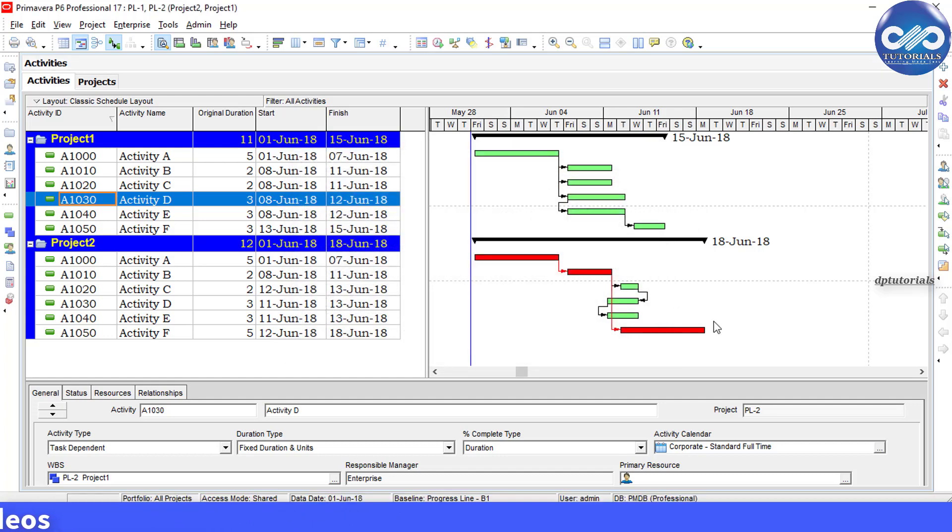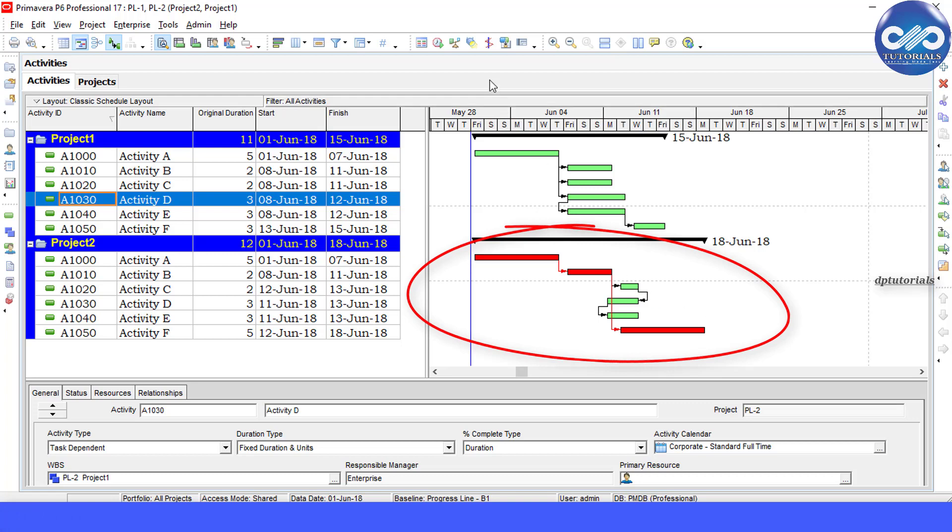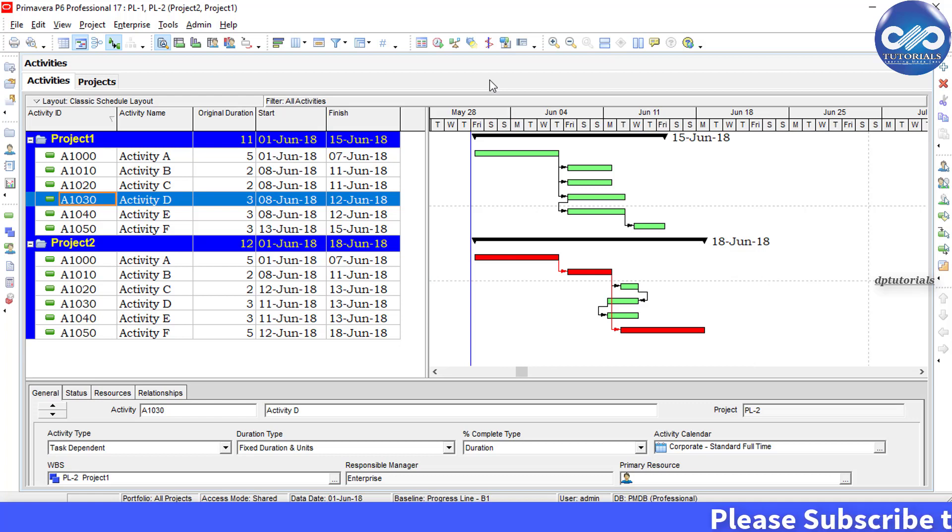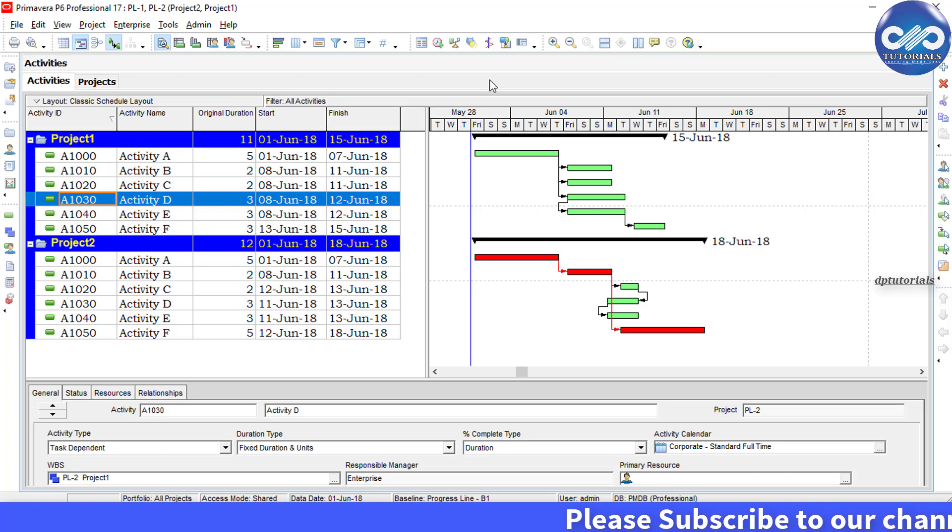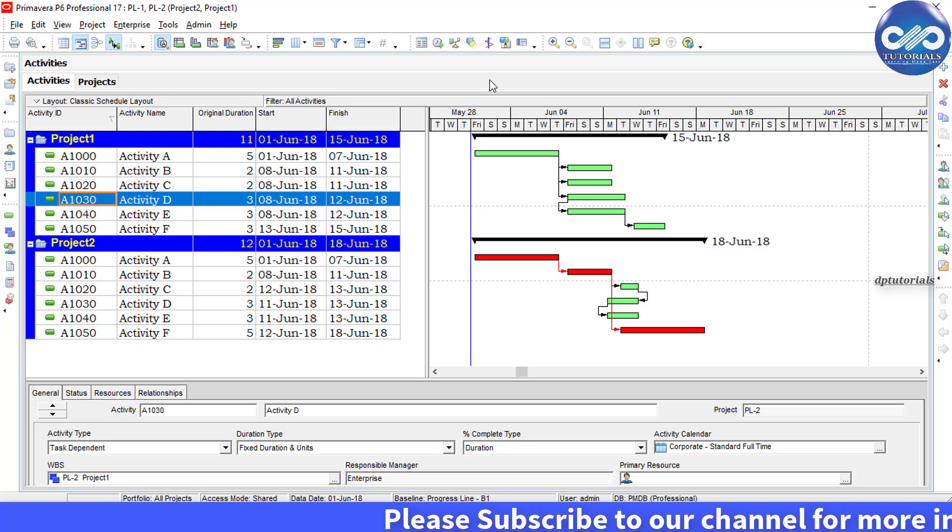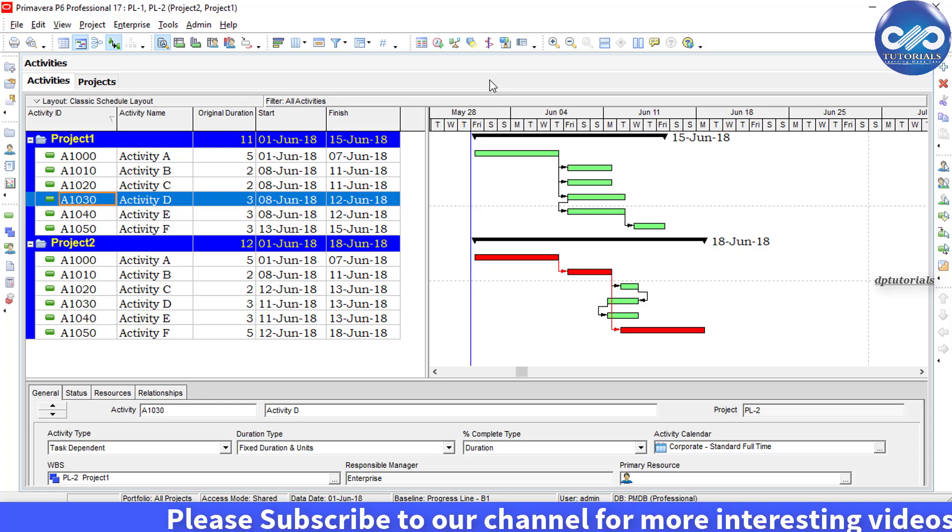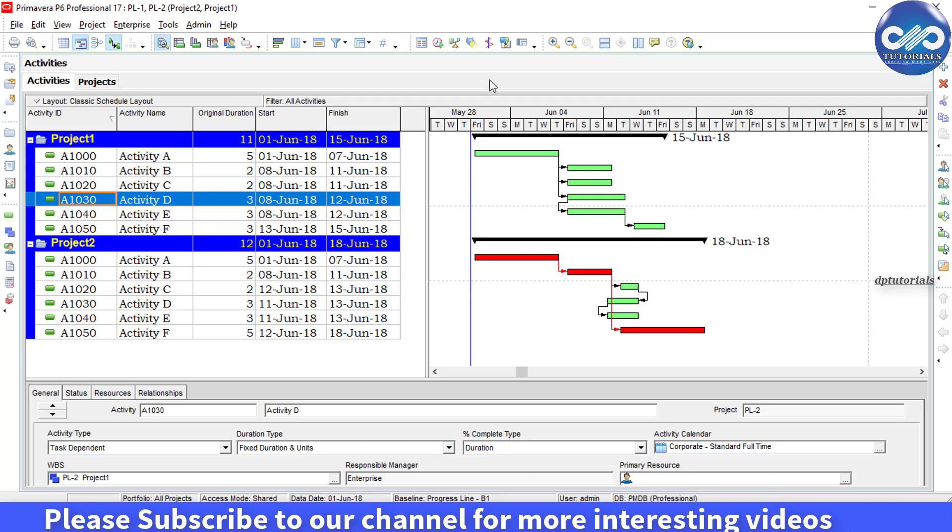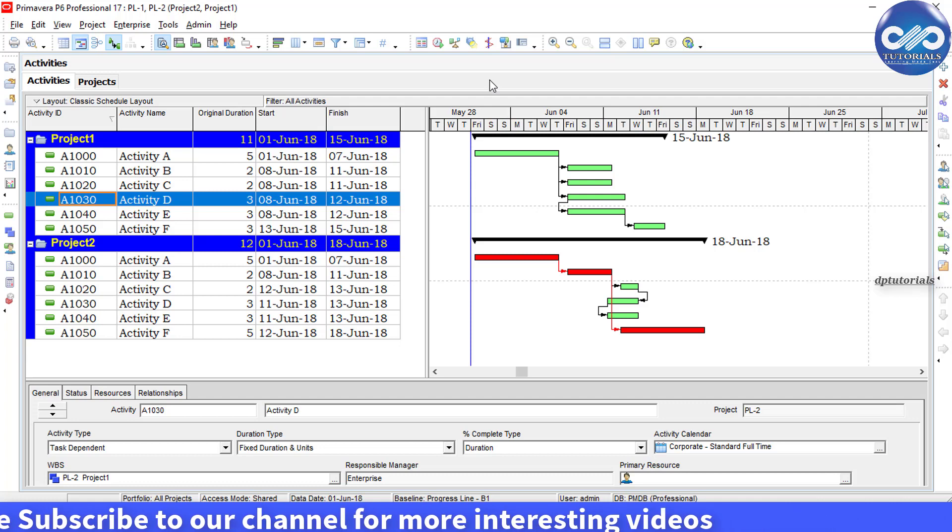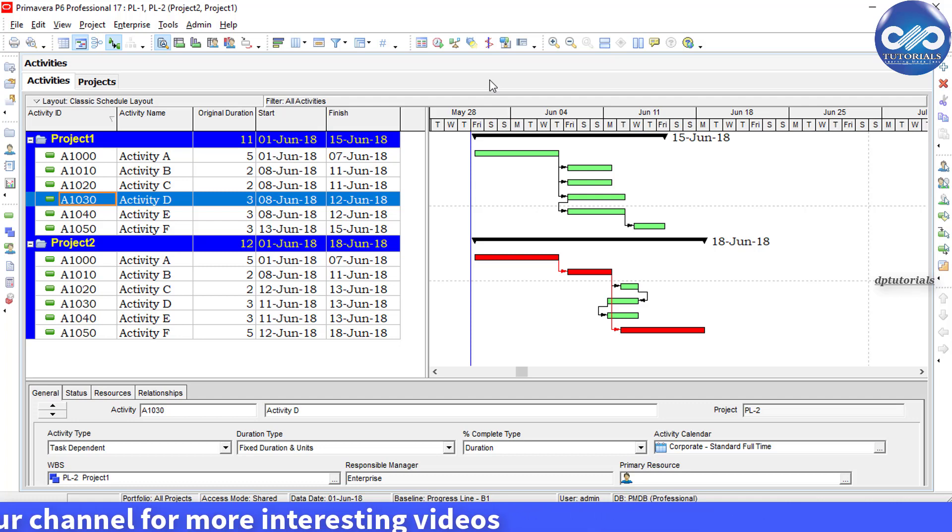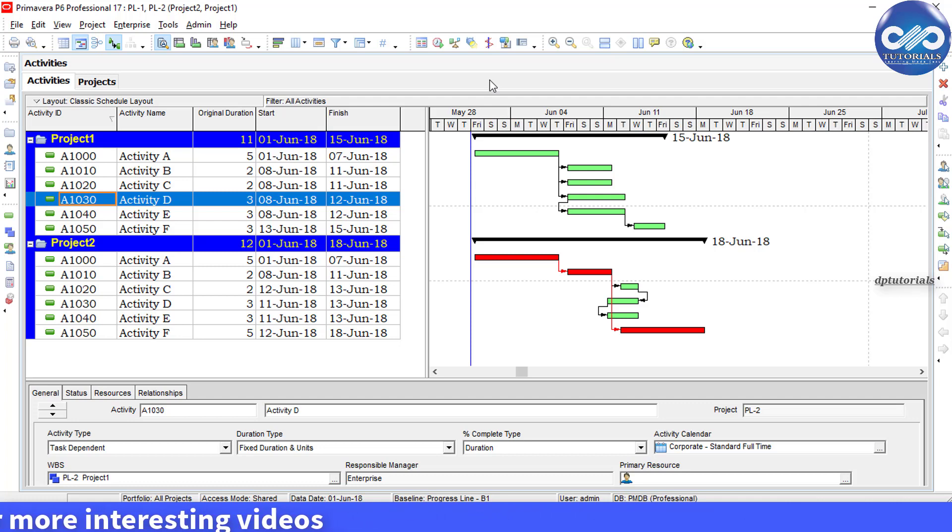be able to see only one critical path like this. So it is based on the finish date of the last activity in your Project 2. In this way, you can display only one critical path with multiple projects